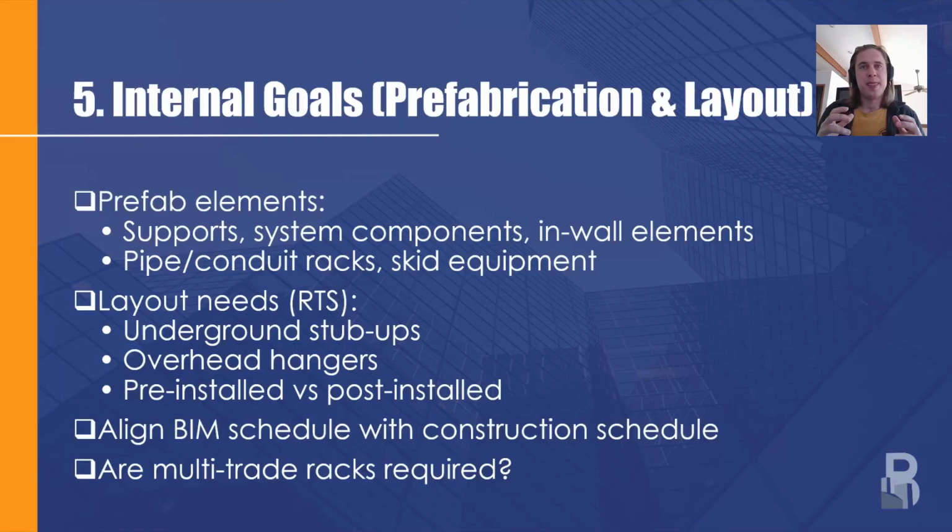So if that's a goal for the project, then having conversations with your general contractor in order to ensure that the coordination schedule and the construction schedule are jiving with that concept. You have to be pretty much done coordinating prior to setting those anchors in order for that to happen.